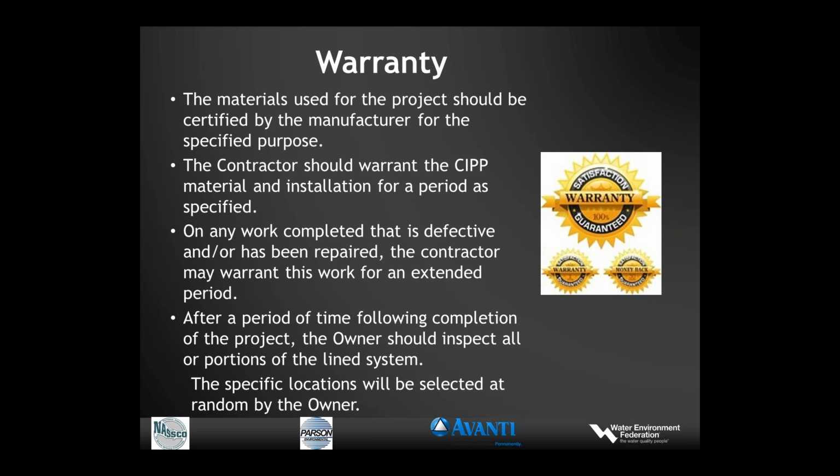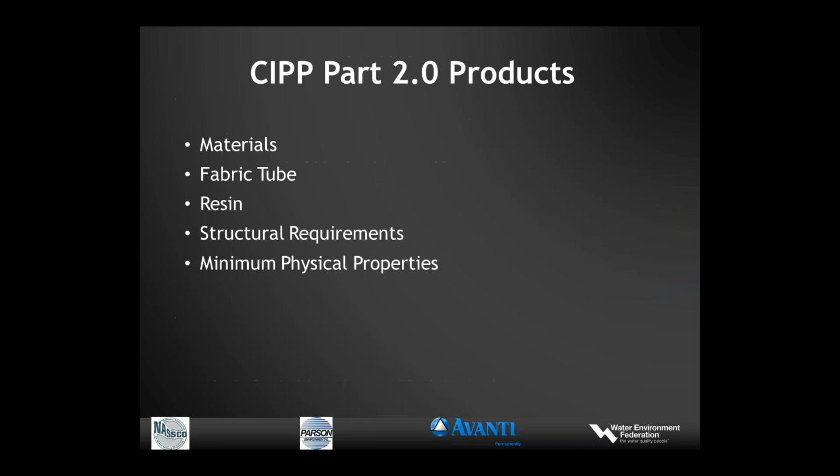And then after a period of time following completion of the project, the owner should select certain line segments to be inspected as a warranty inspection. Okay, that takes care of Part 1 general.